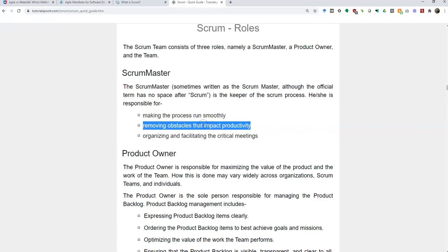So this might be a typical thing that happens: in the middle of developing anything, whether it's waterfall or not, somebody will come, an end user or whatever, like, hey, I had this idea. You really should do this. Or like the boss comes and says, we had a meeting and we decided this has to be in the program, whatever. The Scrum Master ideally will say, no, not this iteration anyway. I'll take this to the product owner and we'll discuss it, and the product owner will decide whether or not it goes into the project.